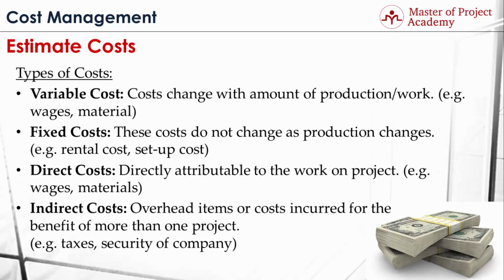Similarly, security guard of the building will not be working on the project, but his salary is a cost for the company. Therefore, when considering costs in project management, these costs are reflected to the direct costs of the project generally. This concept is more about finance, but generally speaking, corporate companies calculate the costs of company and reflect these costs per revenue-generating resource. For instance, cost of a software developer in a project will include the overhead costs of the company as well.